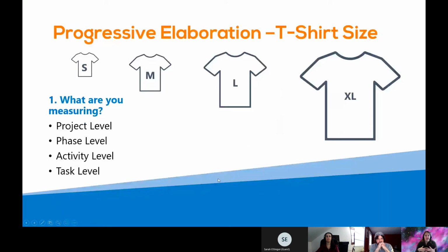So the very first way to think about it is to break up the time, is to actually not do hours at all, but start using ranges and to do instinctual estimates. And so one of them, progressive elaboration, is called the t-shirt size method. So it's this idea of small, medium, large, extra large, and you're starting from a very instinctual gut reaction. How big is this compared to other tasks, for example? This is especially useful with teams or getting validation from someone really quickly on how long you think something's going to take.